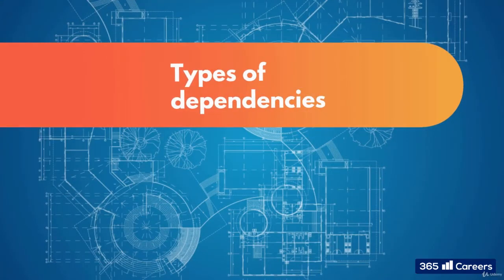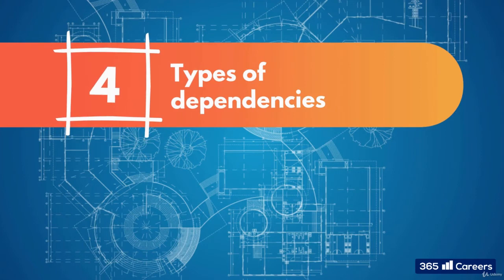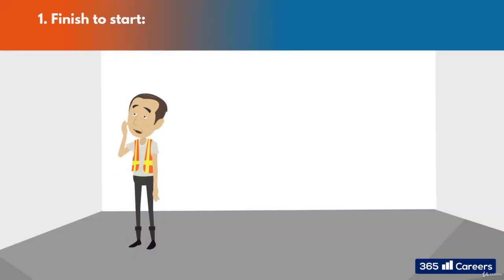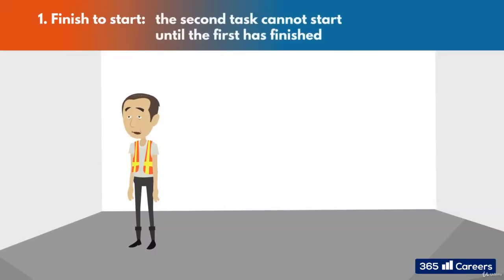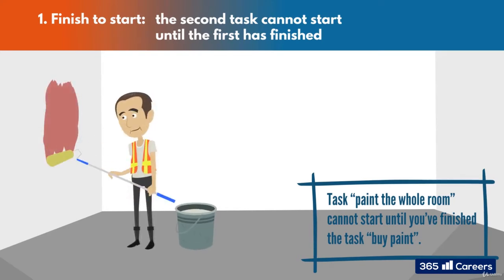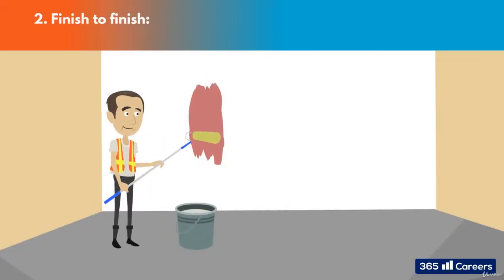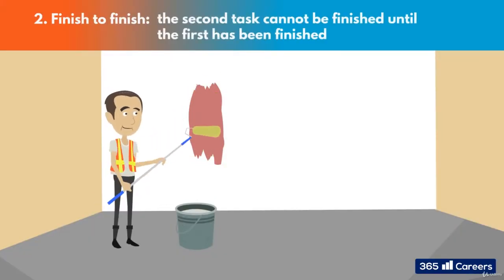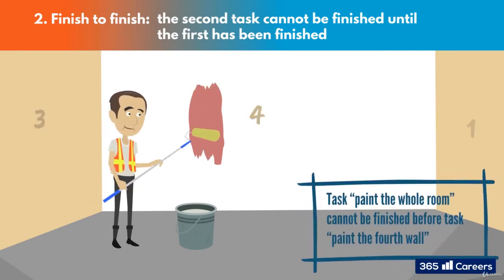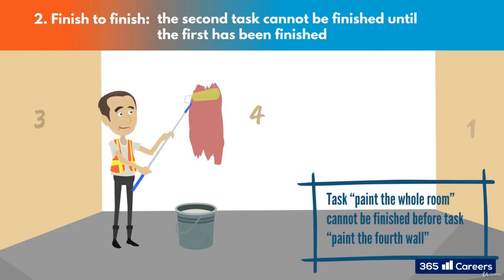Now let's have a look at the types of dependencies — four again is the magic number here. First we have finish to start, where the second task cannot start until the first has finished. The task 'paint the whole room' cannot start until you finish the task 'buy paint.' Second, there is finish to finish, where the second task cannot be finished until the first has been finished. The task 'paint the whole room' cannot be finished before the task 'paint the fourth wall' is fully finished.